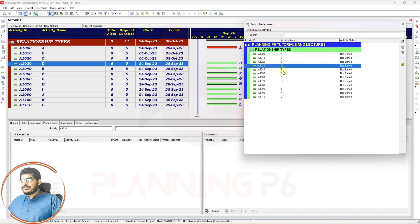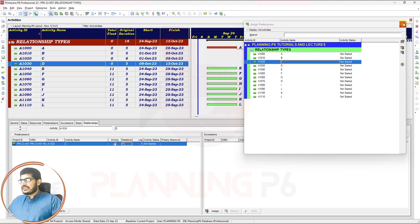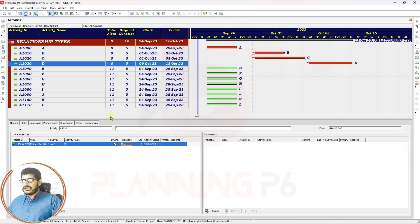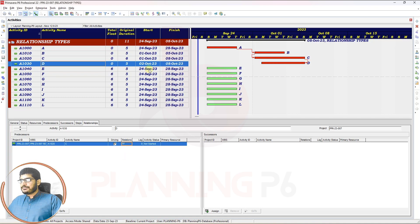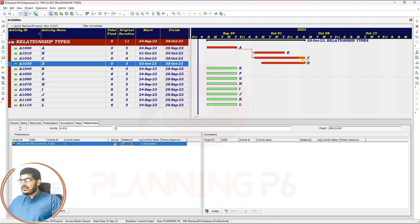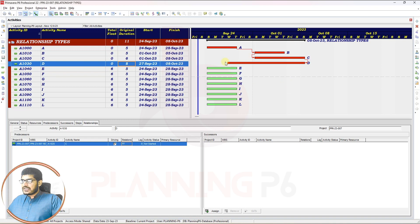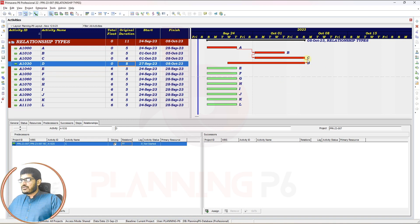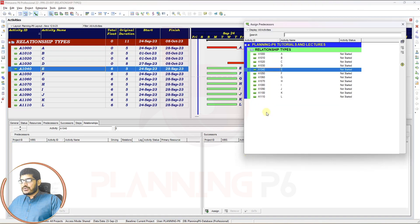Now we will assign Activity C as a predecessor of Activity D and change the relationship type to Finish-to-Finish. You can see that if I increase the duration to more than six — say eight days — the activity starts earlier but the finish remains the same, pushed by the Finish-to-Finish relationship.